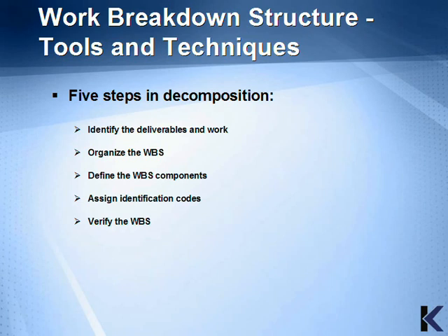If the work breakdown structure is not complete, then schedules, resource assignments, cost, and many other key project areas will be incomplete. This creates a lot of changes and reworks as the omissions are identified. In the next section, we'll review the outputs from this process.